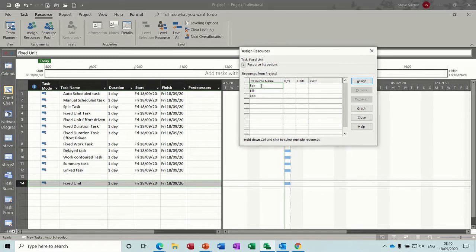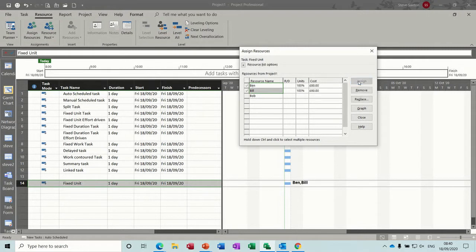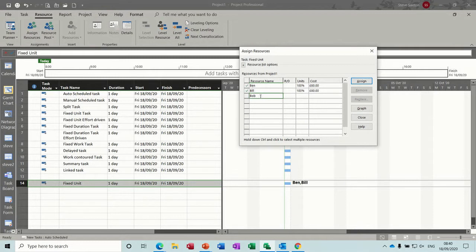So just watch this. So if I add two people, these two people, nothing will happen to the duration, because that's my first allocation. But if I then decide to add a further resource, it will then start driving the duration down, as you can see there.